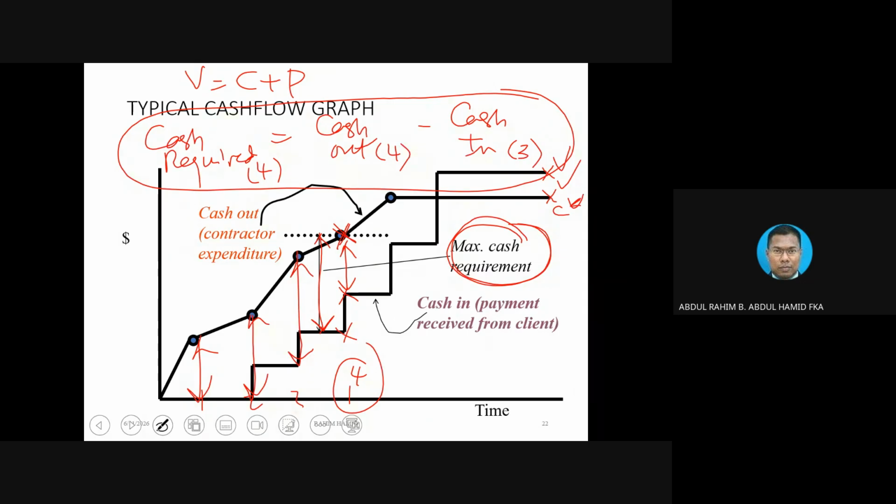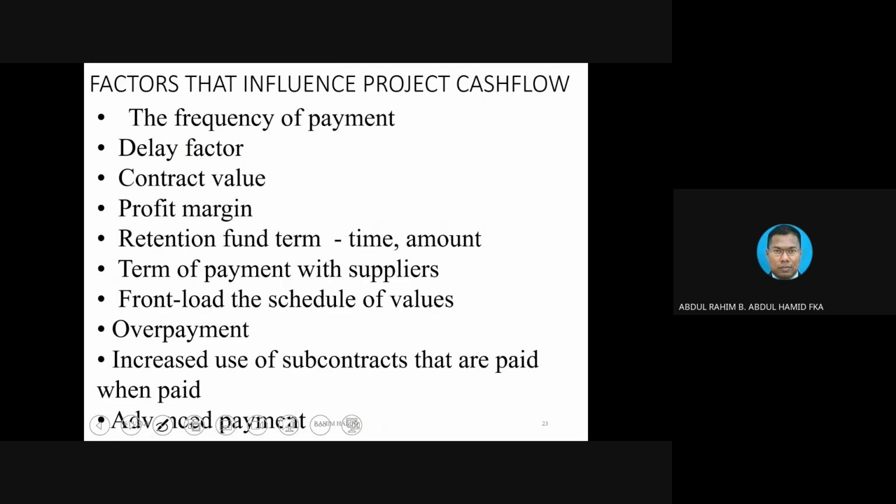Based on the question, normally when you complete the work at the end of May, it is going to be processed and then paid in June. So you have to take a look at the table that you came up with and look at the amount being paid in June. The question is asking for May, but the amount will be paid in June. So don't get confused. Now you already know the typical question that we normally ask.